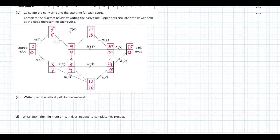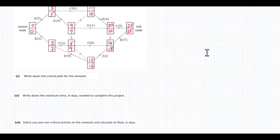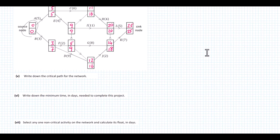The next part asks us to write down the critical path for the network. The critical path consists of nodes where the early and late times are the same. So our critical path is A, E, I, and L. The minimum time in days needed to complete this project is 25 days.